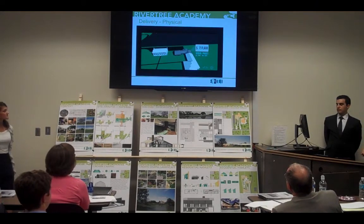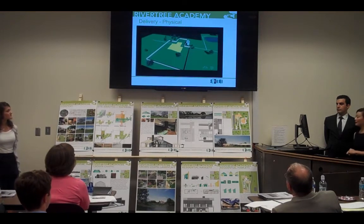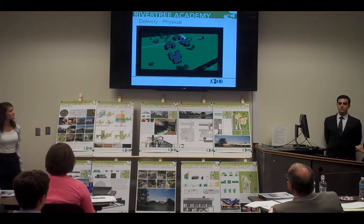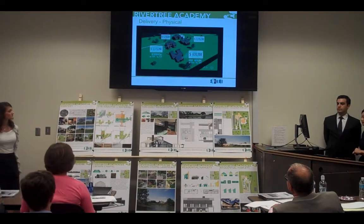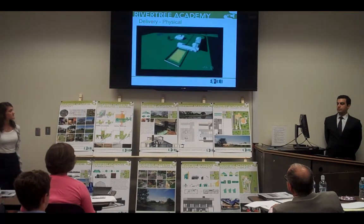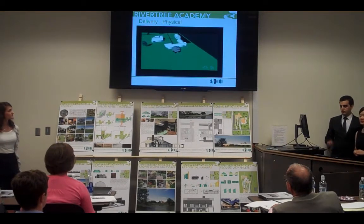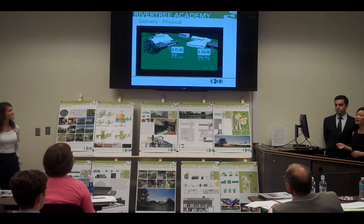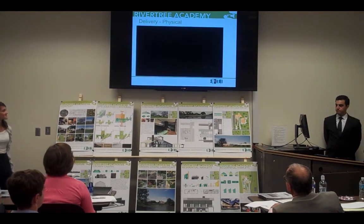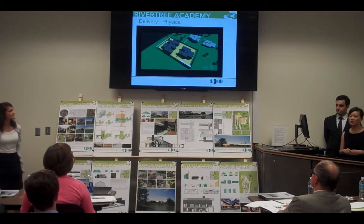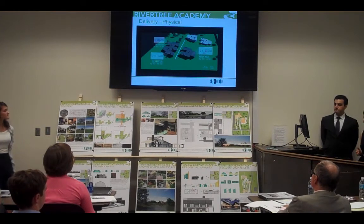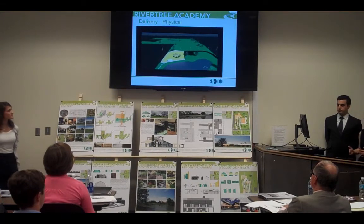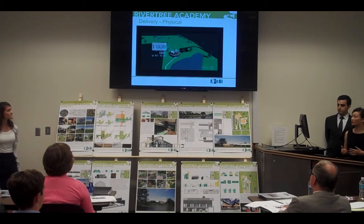With the development of the school, we will build school building phase 2. In addition, we will deliver 12 houses for students, including four houses for staff. Phase 3 includes school building phase 3 and the marketplace, all attached to the existing buildings. At the same time, we will deliver 10 additional houses to meet the needs of more students. The chapel will be delivered last, and the whole project finishes in August 2022.